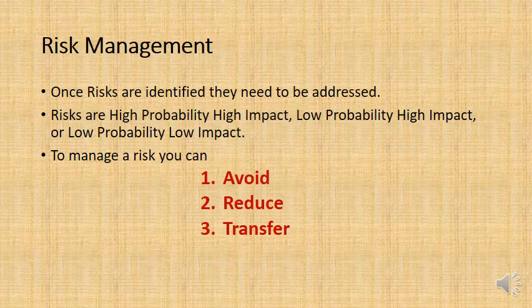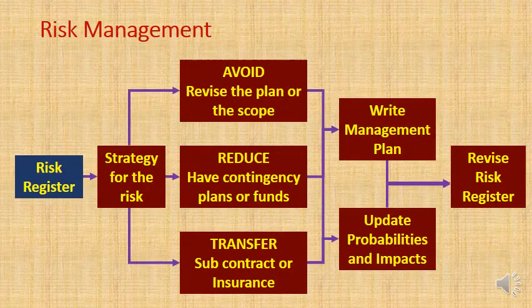I've missed that. And that will determine how you manage the risk, because remember, avoiding the risk basically brings probability down to zero, if that's possible. Reducing the risk, depending on how you're reducing the risk, you're either reducing probability or impact or both. And transferring the risk, you're transferring the impact of the risk. So let's look into that and look at some examples.